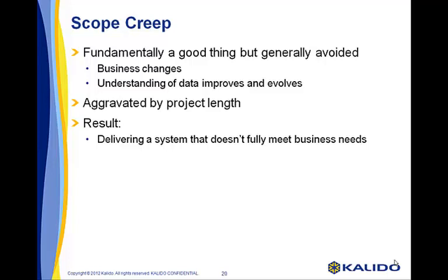The other reason for scope creep is a business change that has happened, such as a reorg or an M&A. The best way to mitigate this risk is short deliverables. The possibility that there are multiple external events like an M&A or a reorg that will affect a 3-month project is small. However, the probability that there are multiple external events in a 9 or 12-month project is close to 100%. Catering for a single major event is usually not a problem in a well-designed system.